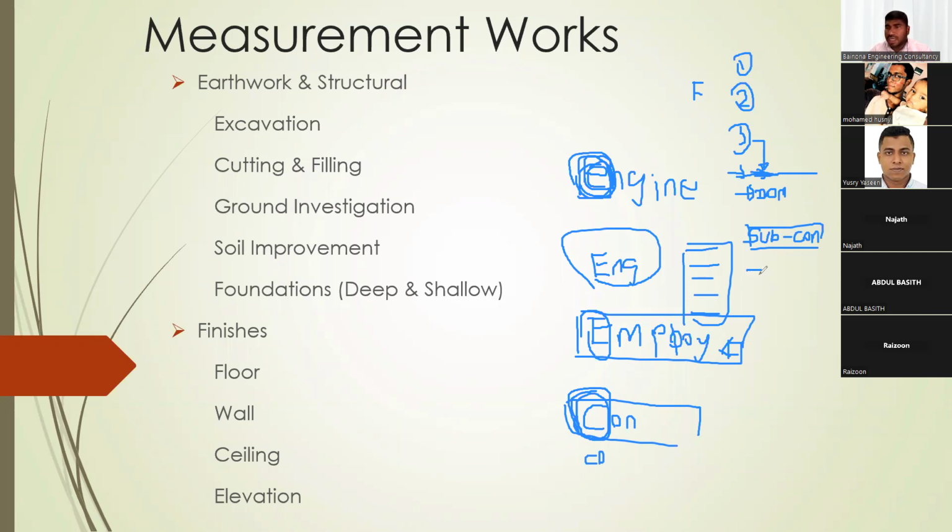Then there will be suppliers. The suppliers come directly through the main contractors, because main contractors have their own procurement department. Like we have a QS department and a technical department, in each company we have many departments, no? Like HR department, admin department, finance department. Every company, every contractor especially, will have a procurement department. This procurement department will deal with these suppliers. Mostly some of our QS also work under procurement. I will come back to that, what the QS role is. Some of the procurement people deal directly with the supplier. These suppliers supply the material to the contractor's store, and the contractor's staff take this material from the store and install it. So that is the supply chain of material supply.